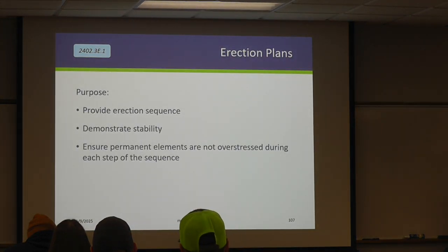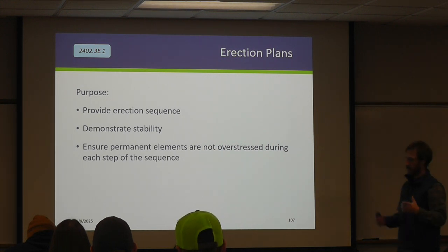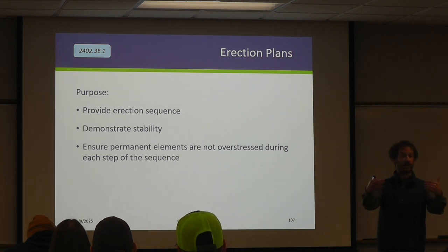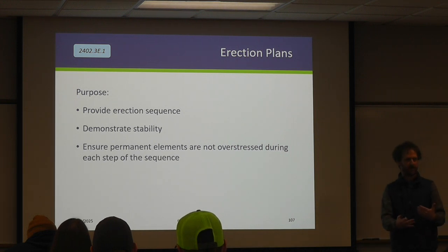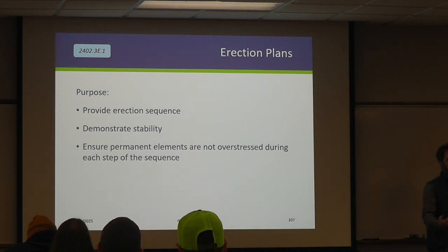We also require erection plans. And so this is that detailed sequence of how the contractor is going to install. So like with our plan, you see the bridge in its completed state, right? The framing plan shows everything linked together. But that's not how we build these things. They come together in pieces. And we have to maintain stability and strength throughout the whole thing.